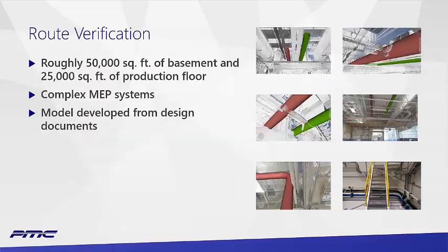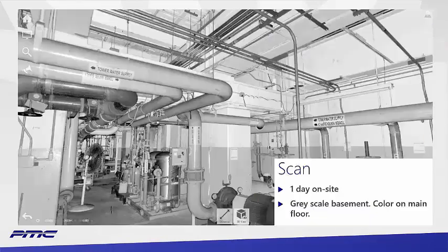So it's just showing some of the stats of a project that we actually did. We routed, I believe these were 16-inch coolant lines, through a space. It only took a couple days of work, and we were able to prove out the route and suggest a ton of corrections that saved an awful lot of money. The last thing you want to do is have a 16-inch pipe not be able to fit through a space correctly. This is one of the scans from it down in the pump room where the line started.